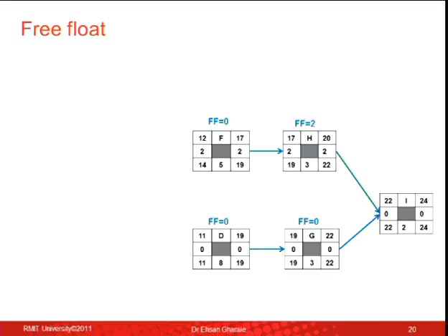So if here I've got 30 as well, so if I's latest start is 30, then that would be 30 as well. Then your total float would have changed. So it depends on that late finish. So the total float is about an activity and the whole project. Free float is about an activity and the following activities.